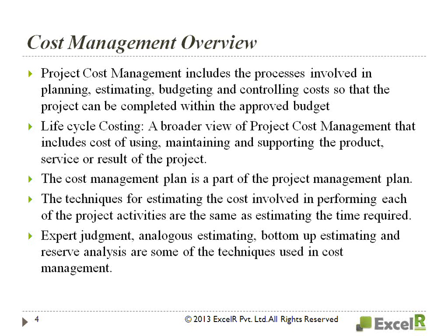Normally any product or any software you develop, or the outcome of the project, may have two things: capex and opex. Capex is the capital expenditure, opex is the operational expenditure. Capital expenditure is the first-time investment you put into developing the software. Once you develop the software, in order to maintain it, the maintenance, the support, the operations you do, you have to take care of that too. So life cycle costing is both capex and opex, capital expenditure and operational expenditure. So you have to consider both.